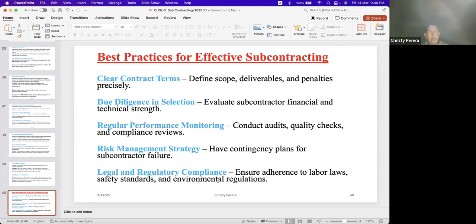Then you can ask me, so how about the liquidated damages in procurement? Yes, liquidated damages, we don't know why it's happening, maybe a shipment delay or some reason. There, you can mention in the contract liquidated damages this much, 0.1% up to 10 days or whatever it is.